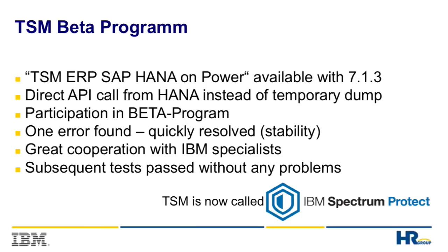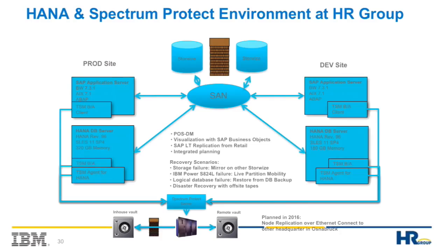To be honest, the customer found an error with the beta program on the TSM code. He came back to IBM and we fixed that before going live. That was a very good effort from the customer, going inside this program to help us get the code up and running and ready for the production date, when we do the final migration.